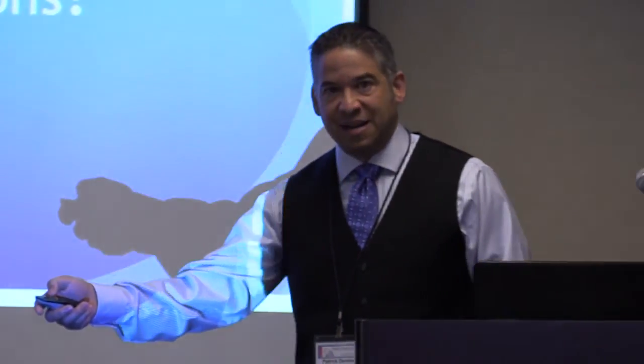This is just an example: we're going to require you to have your statement of work already created before you exit stage 2. That way, expectations are communicated early, so that by the time you get to 3, I'm not telling you, Gene, I need you to do this work. I can tell you much sooner. The idea is identifying expectations and communicating them as early in the process as possible.